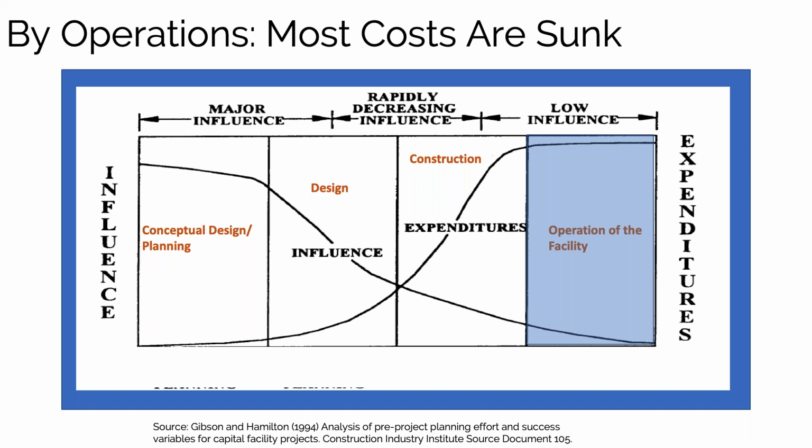You have whatever assets you have, they're made out of whatever material they're made of, they're whatever size they are, they're in whatever location. And most of that is really difficult to change. So by this point, you have almost no influence, and it's going to cost you a lot of money to make a change. So this is why we really want to make sure that we see the asset's life starting much, much earlier in the process, because if we wait until we get the assets turned over to us after construction, there's not a whole lot we can do to try to influence what kinds of assets, where they're placed, what kind of treatment systems, that type of stuff.